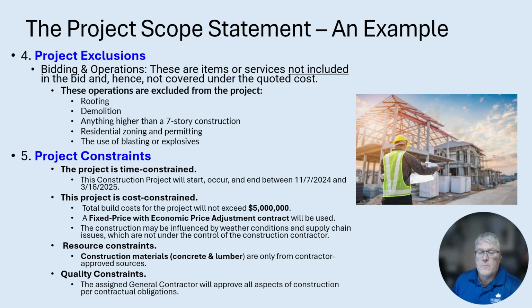Further, project exclusions, bidding and operations. These are items or services not included in the bid and hence not covered under the quoted costs. These operations are excluded from the project to include roofing, demolition, anything higher than 7-story construction, residential zoning and permitting, the use of blasting or explosives.